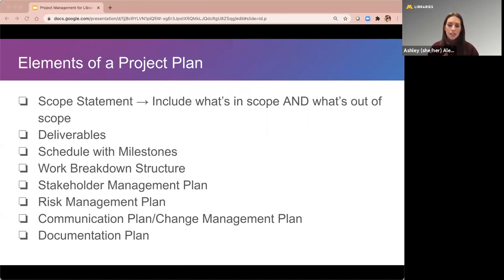Next is the communication and change management plan. So most projects require some sort of change in process or behavior when implemented. It could be upgrading a tool and having people working on a new workflow, or a new process that requires people to change the way they do things or interact with people. So this plan helps you identify when you'll need to communicate what and how you're going to bring people up to speed, whether it's through training or piloting a new process with a team.